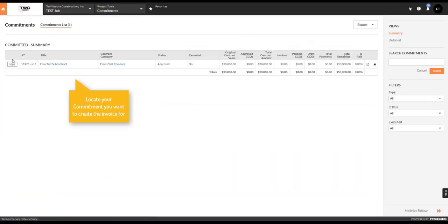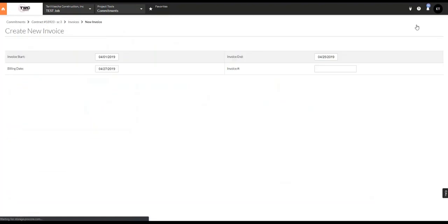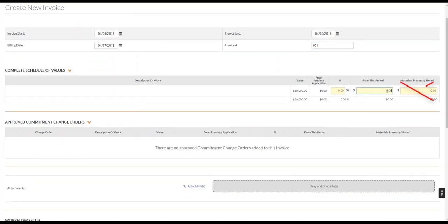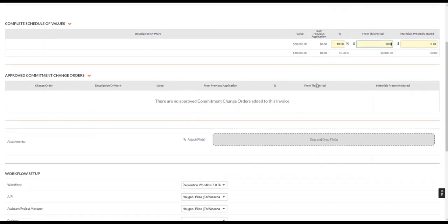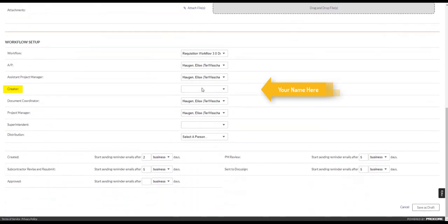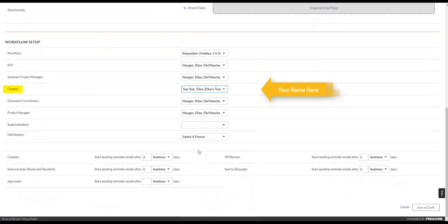This is where all of your subcontracts on the project will live. Click View. This is your subcontractor overview page. Go up to the top right and click Create Invoice. The dates are pre-populated, so just enter in your invoice number — it's for your reference only. Ignore Materials Presently Stored and just enter in the amount from this period. Scroll down to the Workflow Setup and in the Creator slot, search for your name and enter it into the workflow.